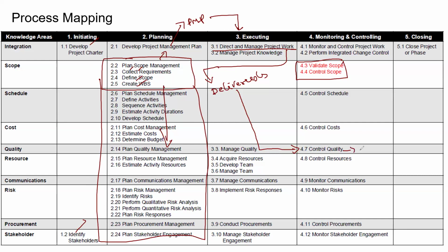If it is meeting the specifications, the output will be verified deliverables. So it's like, okay, test passed. What's the next step for a project manager? Once your quality control team says your team has done the work as per the quality requirements, very good. The next step is you have to get acceptance from your customer.